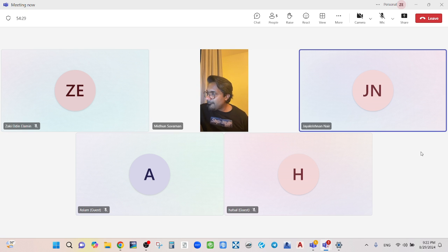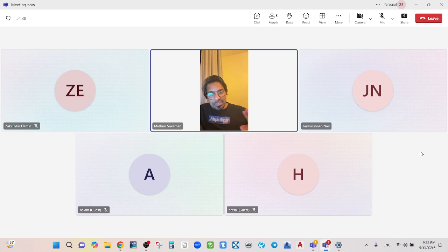So the employer will give back the tender guarantees to the other bidders when one is awarded. When one is awarded, I will return all the guarantees to the other bidders. I will be sending a regret mail, or there will be debriefing. I will say, guys, this time you're not qualified. However, thanks for participating. These are the issues for which you were not qualified, and you can collect your bond from this office or the head office, whatever.